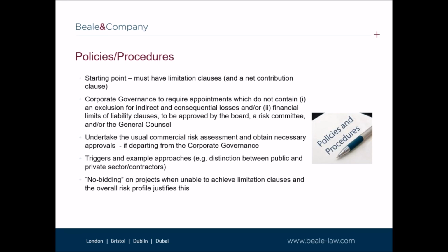A further approach by another large international consultant is to require any private sector contract with unlimited liability to attend a risk board meeting for approval. However, in relation to engaging with contractors, most of our clients with vigorous corporate policies treat working with contractors very differently to anyone else and commonly require that limitation and exclusion clauses are included in appointments with contractors.